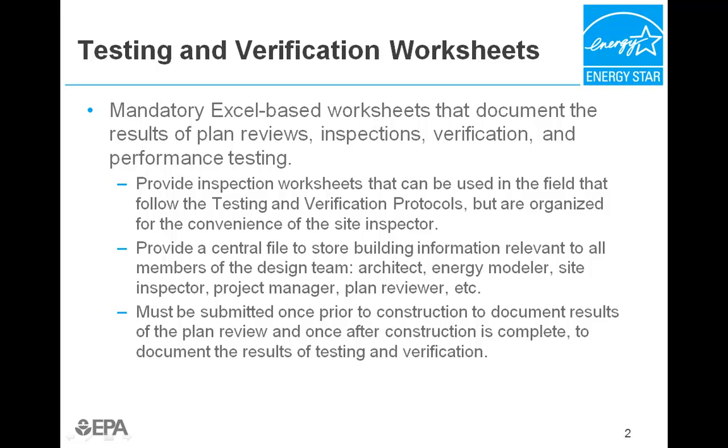The worksheets follow the requirements of each protocol to help ensure nothing is missed, but are organized chronologically to a typical construction schedule for the convenience of the site inspector and provide a central file to store building information relevant to all members of the design team, from the architect and energy modeler to the project manager and site inspector.